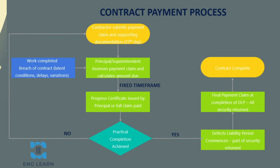The payment process begins with the contractor submitting a claim and supporting documentation — this typically happens monthly by a specific day of the month. The principal and superintendent then need to assess the claim to calculate the true amount due, based on the amount of works completed as well as any breach of contract affecting the amount due through latent conditions, delays, or variations. This is typically a legal obligation to ensure contractors are treated fairly and paid on time, preventing clients from unfairly withholding payment. If the principal does not respond in time, the contractor will typically be owed payment of the full claim.